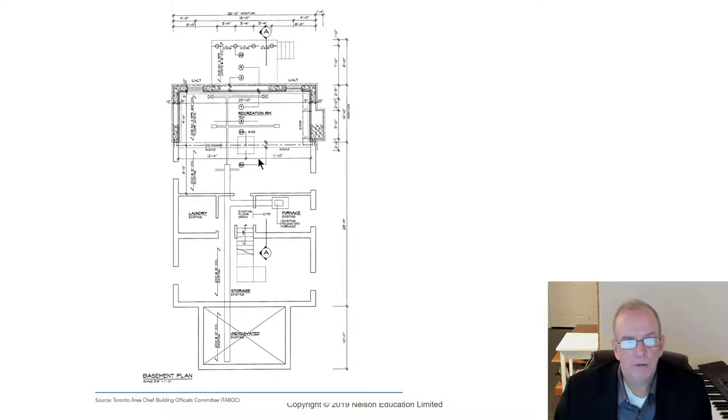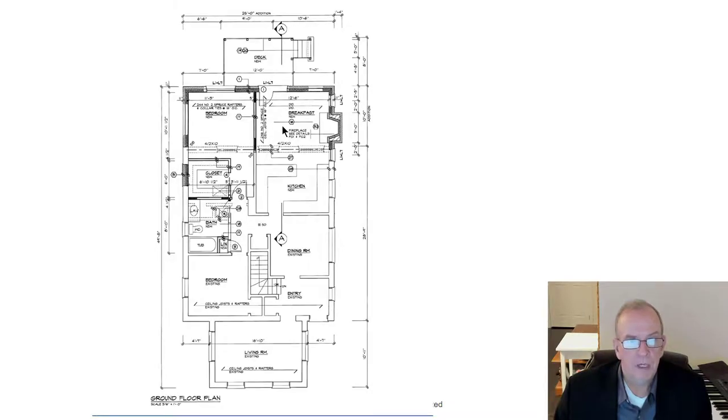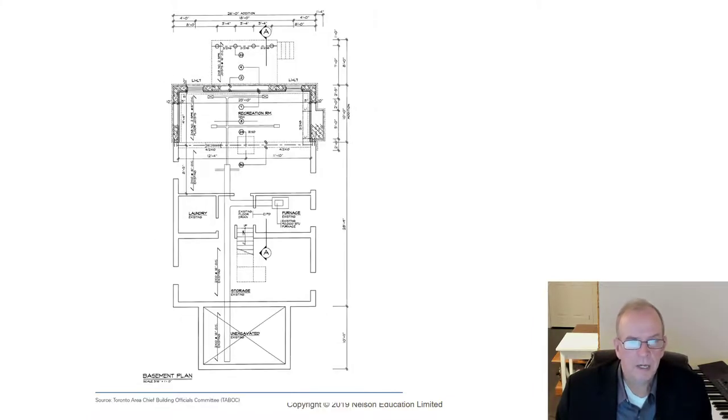And the other factors that you might have to consider too is the family living in this house. It's a pretty small house, so I've got my doubts on that one. Some houses that are much bigger, though, we've had where we would have the family still live in the house. In cases like that, we would set up like a temporary kitchen in the basement. So you'd have like a stove and a fridge sort of set up, maybe with a simple counter that they could use for the few months that you would be working on the house. That's a possibility, right?